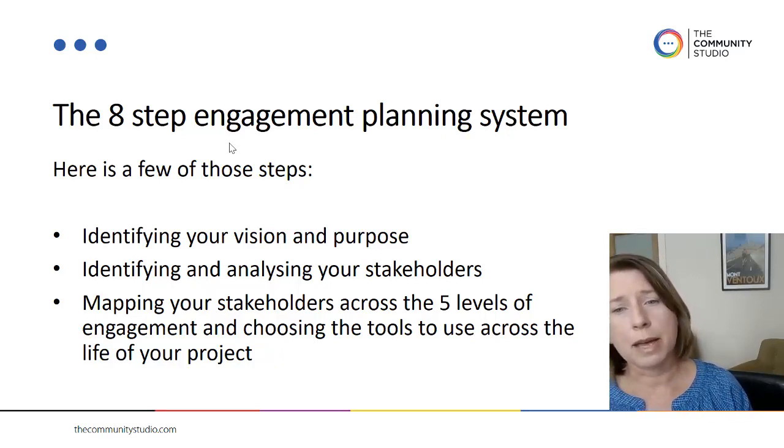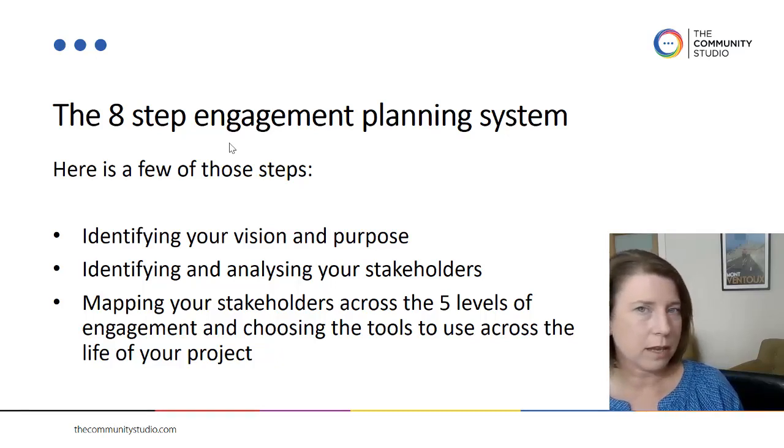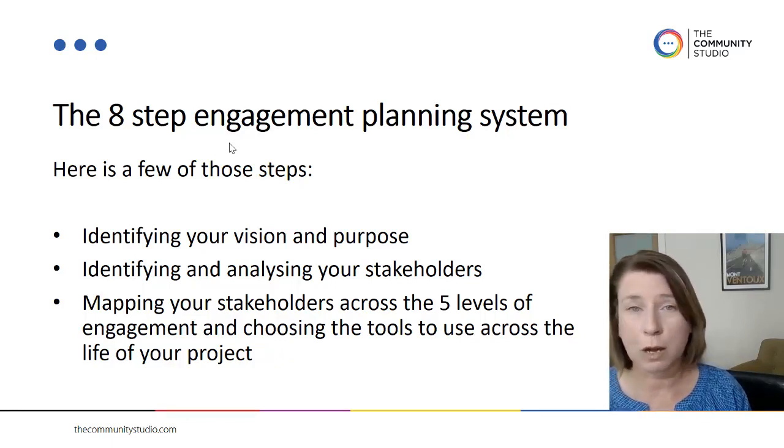You also need to map out your stakeholders across those 5 levels of engagement, as I said earlier, and that will dictate what tools and what your promise is to each of those stakeholders. Now, this is where you start implementation planning, knowing what level of engagement you're working with everybody on and starting to map out what those tools are.